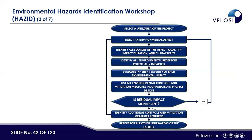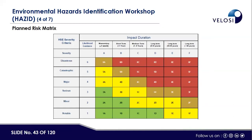This is a flow chart for the ENVID workshop. First, we select an environmental aspect and identify its sources. We then quantify the impacts, assess impact duration and characterization, and identify receptors potentially impacted by the project. We then evaluate the inherent severity of each environmental impact and list all the environmental controls and mitigation measures incorporated in the project design. If residual impacts are still significant, additional controls or mitigations are added. The environmental impact severity matrix is used for planned environmental impacts, with severity ranging from notable, minor, serious, major, catastrophic, to disaster, and impact duration from momentary (less than one week) through short-term, medium-term, long-term (up to more than 30 years).